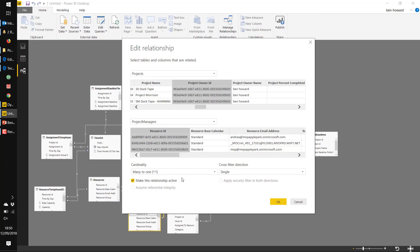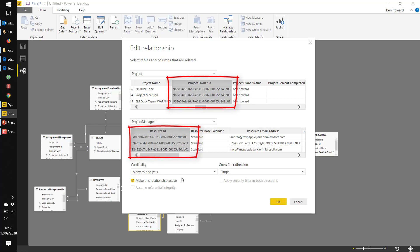Once we've done that, back in Power Query we can create a relationship between the project owner ID in the projects table and the resource ID in the new table that I've called project managers.